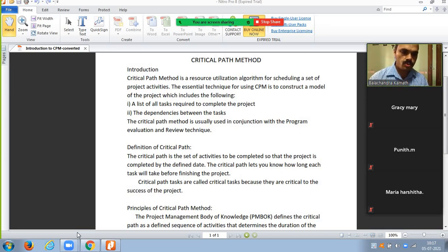Okay, the second step could be constructing the pillars first. Metro pillars, and then laying the track, and then constructing the metro stations. Then once everything is ready, a trial run of the train on that particular route. So this is what could be a set of tasks to be completed as part of the metro construction project.